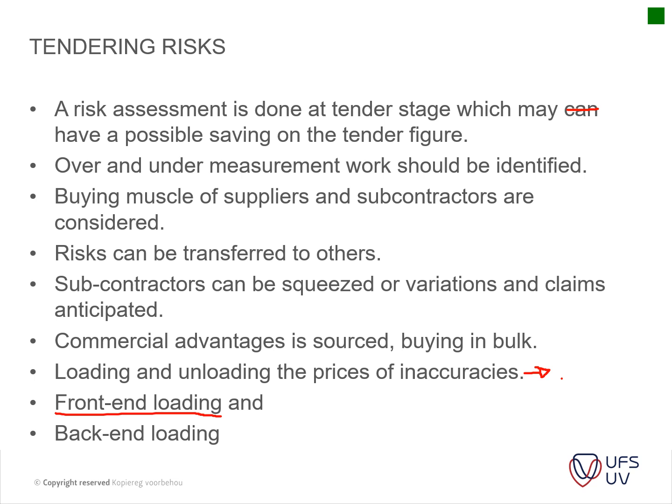When you remeasure your work on site, your excavations might be much less than you anticipated, in which instance you will actually lose on your contract, because now your back end items will not have the necessary rates or bulk of finance to carry you through the project. So please note that this is a very risky item, and the QSs usually pick it up when you do your leveling of rates before you get appointed.